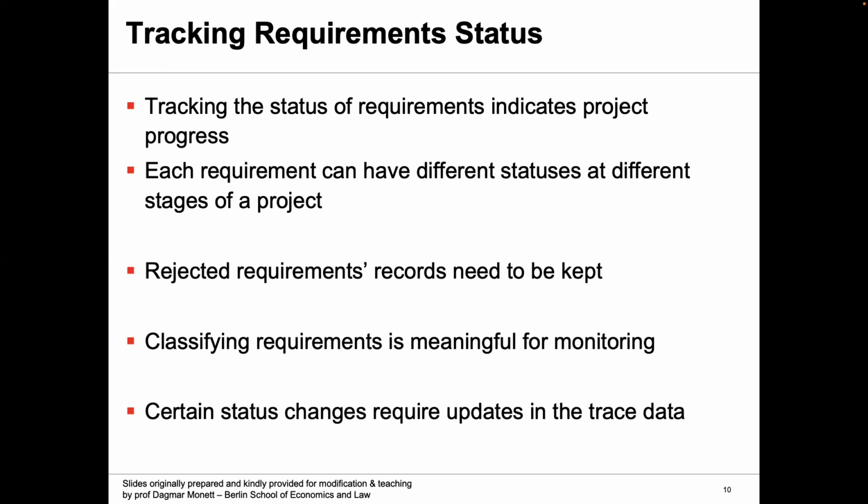Okay, so classifying requirements is meaningful for monitoring. Yeah, and you can classify them into several status categories, and it's more meaningful than trying to monitor the percent completion of each requirement, or trying to monitor the complete release baseline. So if you have that status attached to each requirement, that is going to help you in a meaningful monitoring of the requirements as well.